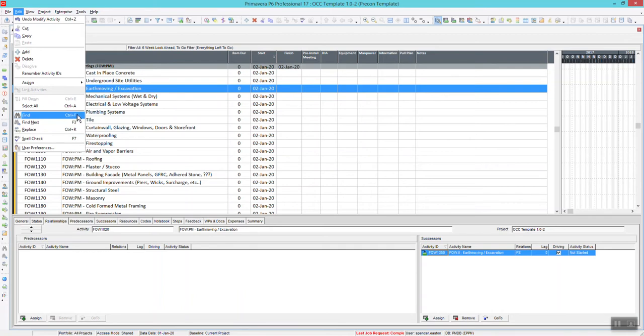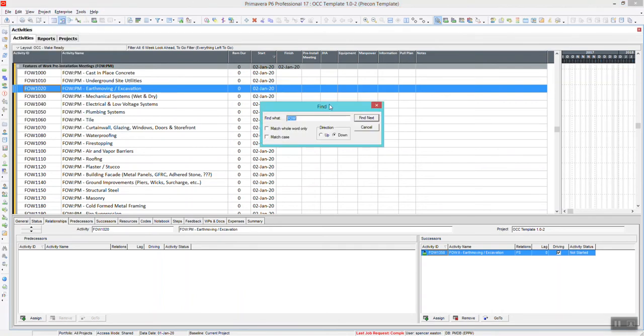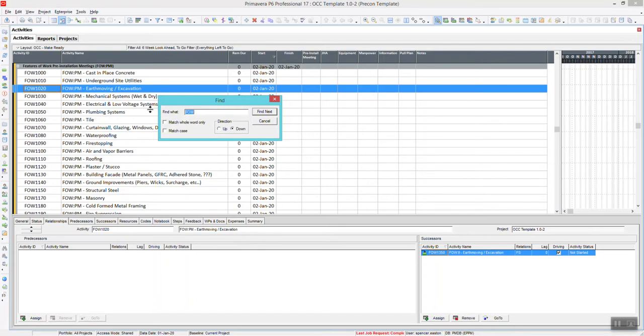I usually do it just by hitting Control-F on your keyboard. It pulls up this screen, and it works in any spreadsheet or list in P6.